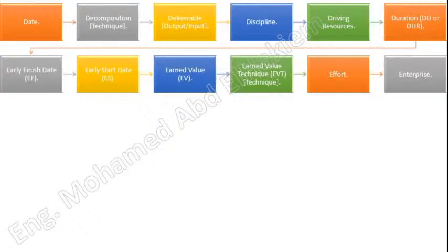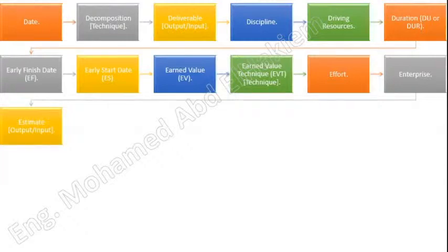Estimate, output/input. A quantitative assessment of the likely amount or outcome. Usually applied to project costs, resources, effort, and durations, and is usually preceded by a modifier, that is, preliminary, conceptual, feasibility, order of magnitude, definitive. It should always include some indication of accuracy, for example, ±X%.